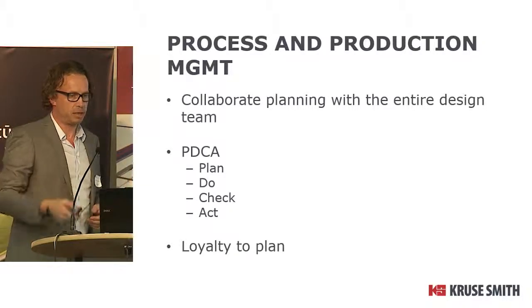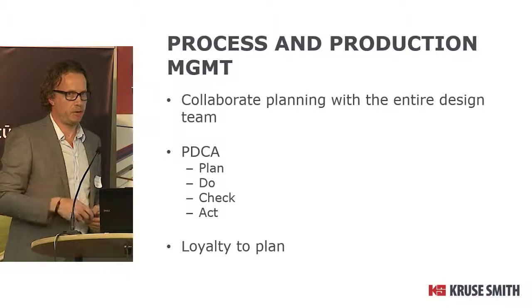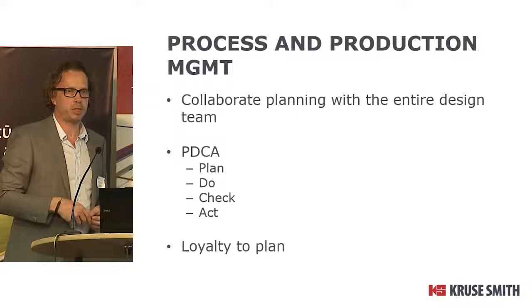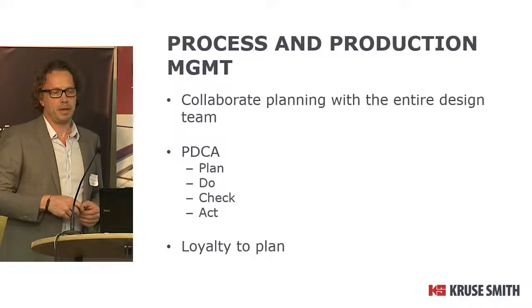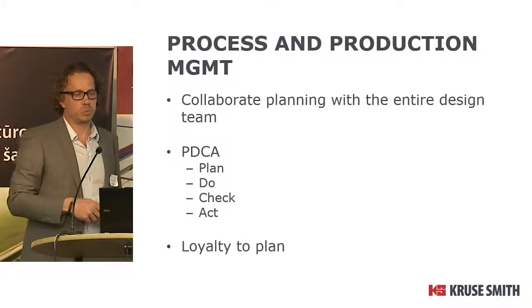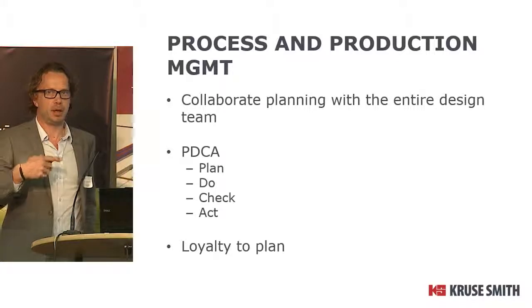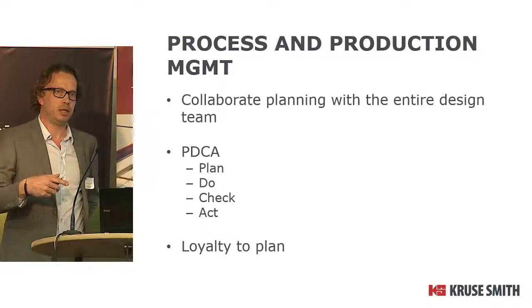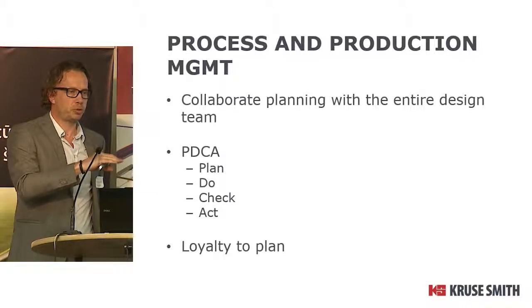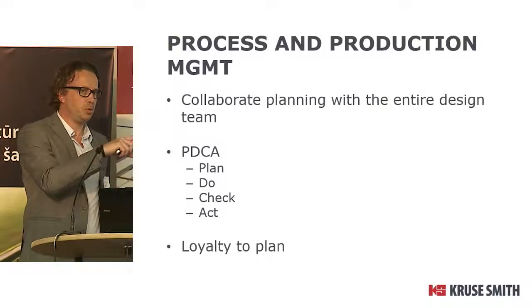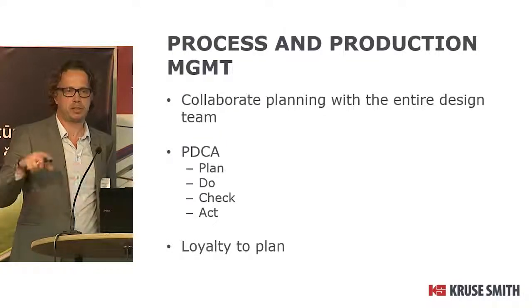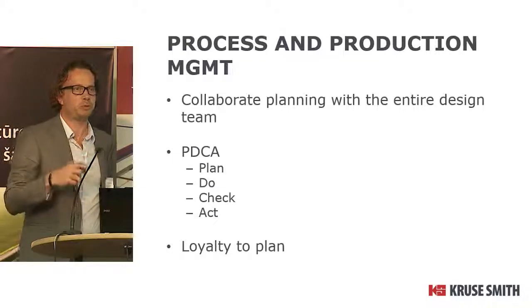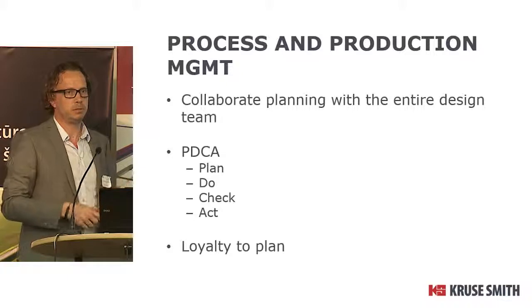That was quite amazing because everybody is loyal to the plan. I think we have an average of 95% complete at all times during design. But you also have to show them every session that you use the plan. So every session, the agenda is to go through the agenda and link it to the schedule for design. And at the end, we look forward and say, okay, next meeting, next week, what should we focus on? The entire design team is there and says, okay, we need to focus on the windows, or we need to focus on the elevators the next meeting.